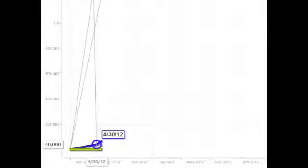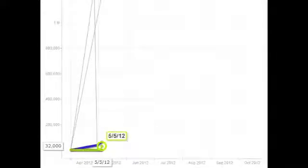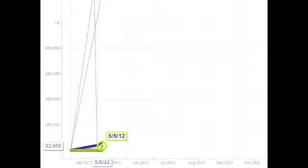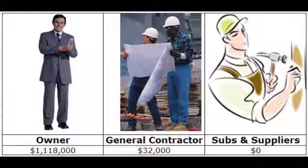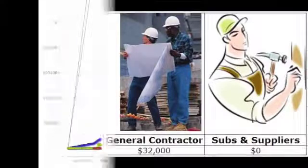After month one, the general contractor has earned $40,000, as shown by the blue line, and will be paid $32,000, as shown by the green line. The contractor will then wait 14 days and pay his subcontractors less 10% retainage.